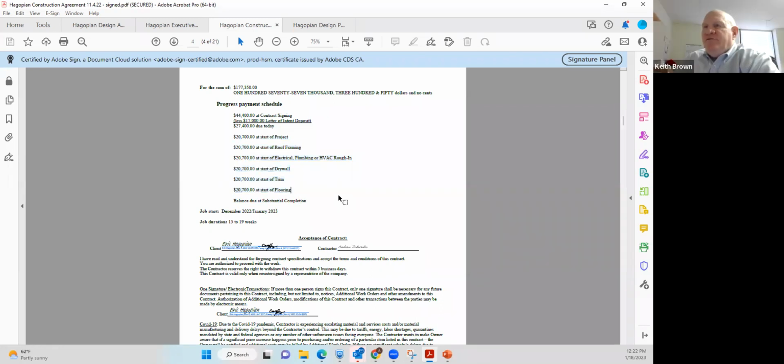I know it's maybe a little picky, but why don't we put the exact balance due at substantial completion? We used to do that. They stopped doing that before I became a project developer. I don't know the exact reasoning, but I think it's because if we had additional work orders being tagged to that, people were being a little legalistic and saying my contract says I only owe this much. Okay, I was just curious about that. I ask a lot of these types of questions. I'm sorry. No, that's what training's for.